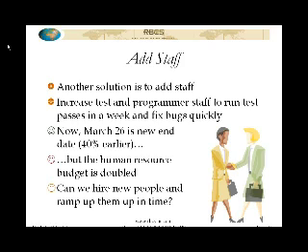But from a cost point of view, we've just doubled the cost. So people aren't likely to be happy about that. And there's also this risk that, well, maybe we can't actually hire people and ramp them up in time. Maybe bring people in, but by the time they're actually able to be productive contributors, the project's over.